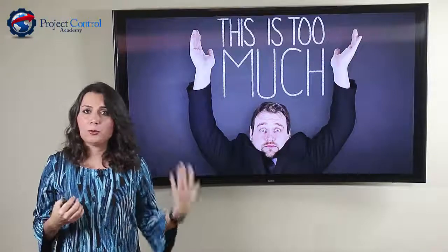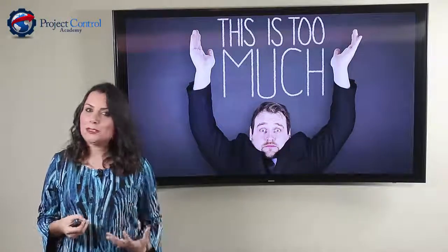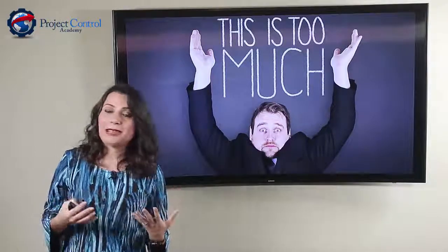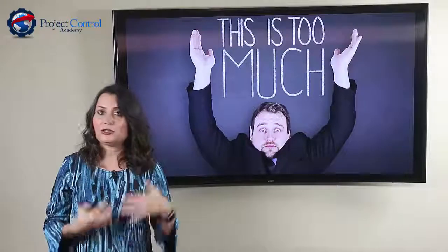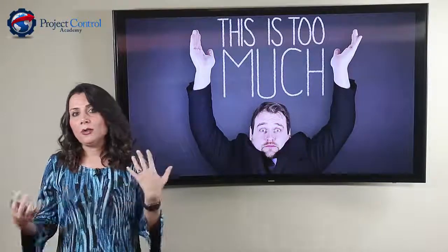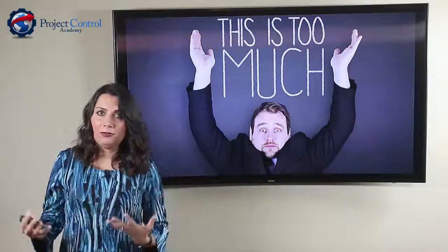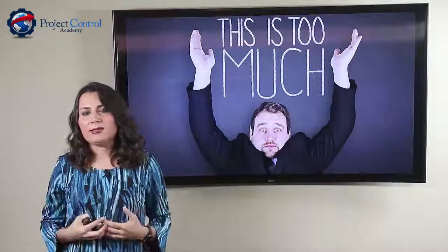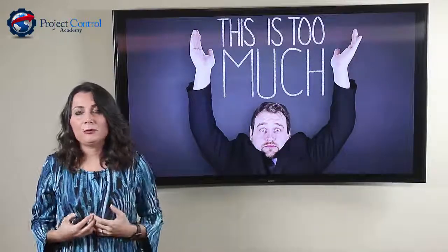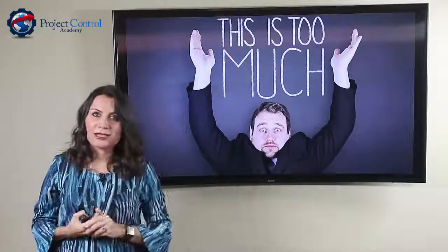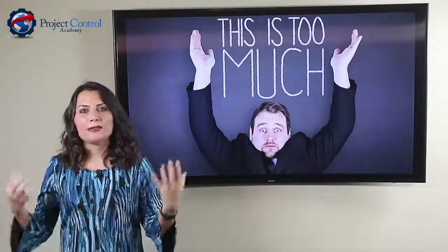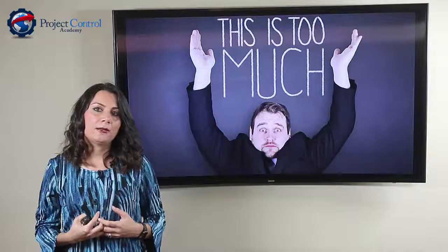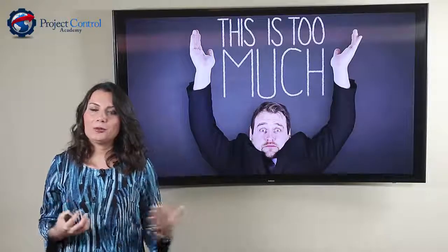And sometimes, in support of your project controls plan, you may need to develop other processes and procedures. For example, schedule development and maintenance procedure, cost management procedure, change management procedure. So if your company has already developed some project control related procedures, then your task would be easy. It's not a hard deliverable for you to develop the project controls plan. As long as you have those procedures and you're clear on the strategy, it's just a matter of tailoring the company's processes according to your project's needs.